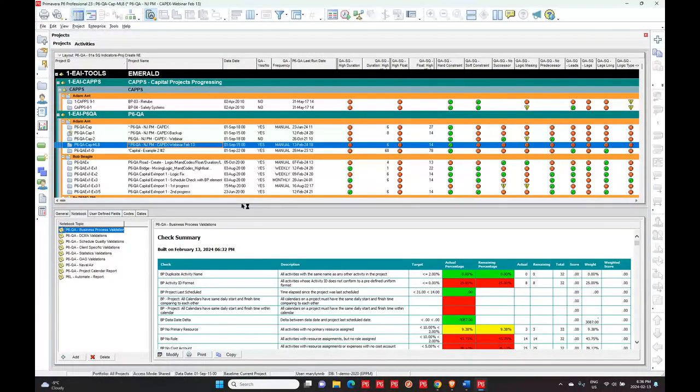But I've worked with turnaround schedules, and I've worked with construction schedules where, I'll give you an example. They're setting up scaffolding. So you run the reports, for example, for pre-work, and you end up with 8 or 10 pages of activities, and every one of them has an activity name that says erect scaffolding.